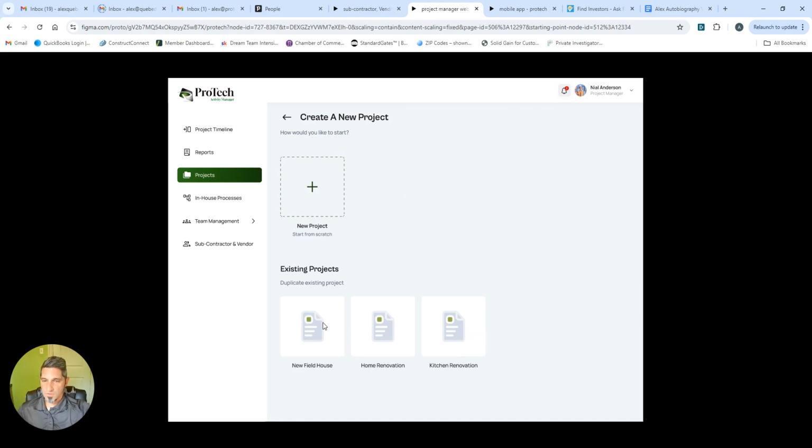These templates are projects that you've already completed, meaning that you've built out these projects with forecasted durations. You then executed the project, and what you get here is actual duration. This is incredibly valuable, especially if you do projects that are similar, because once you complete the project, it's no longer a forecast. It's actual data, which is very valuable. And the more times that you use this template, the better it will be.